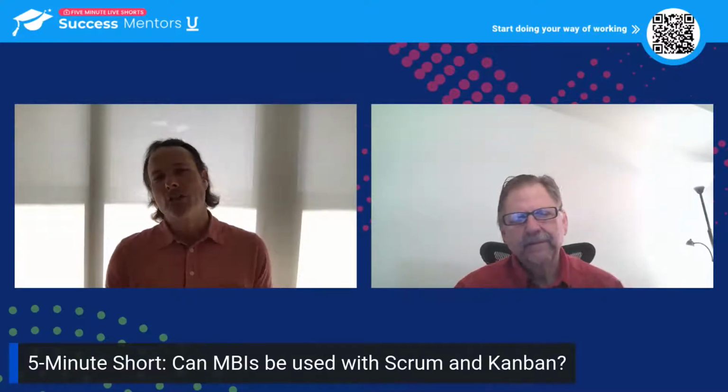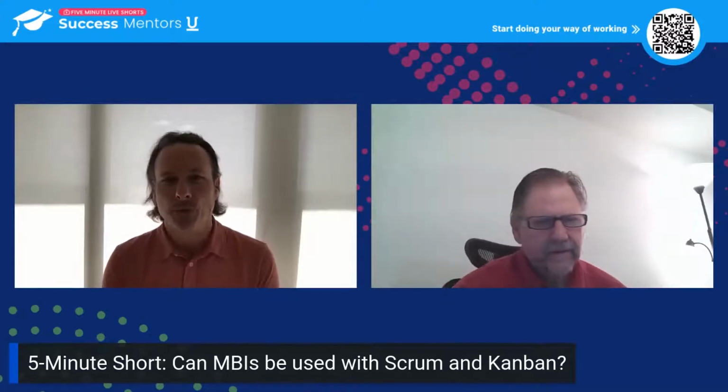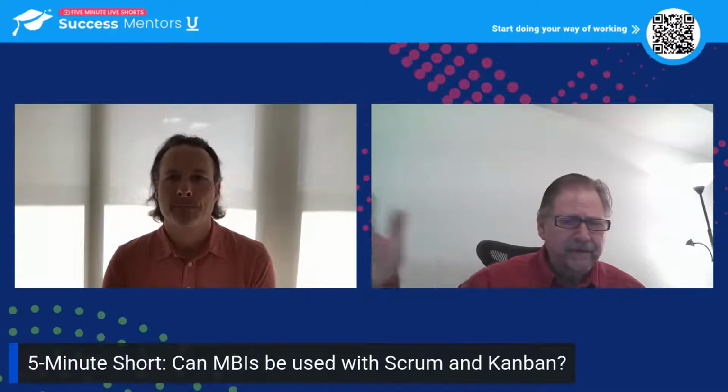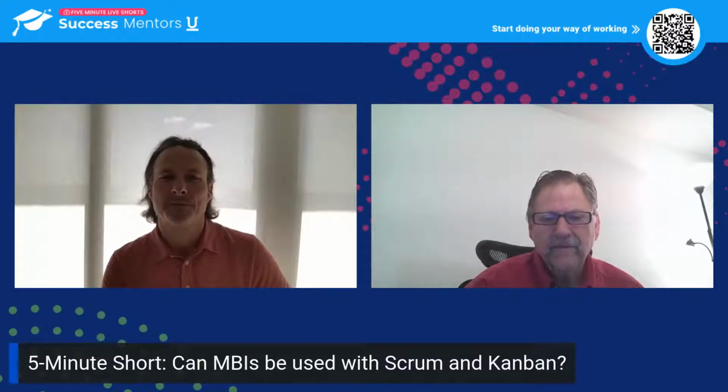So, Al, can you explain how MBIs can be used with a Scrum approach or a Kanban approach? Let me make clear one other thing with the MBI. The full definition is the smallest releasable increment of value that's consumable by the customer, so they get value, as well as makes sense for the business, because there is a transaction cost here. The transaction cost can be paid by the customer in terms of having to relearn things, or by the business because getting it out in the field may take people offline. We've had past MBIs where we could have released it, the customer could have consumed it, but it wasn't worth the transaction cost. So we want to keep that in mind.